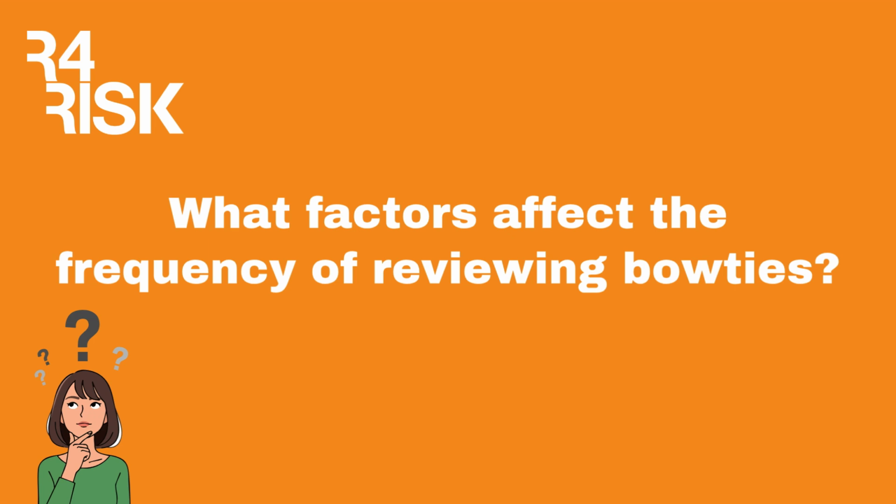But normally you would review your bow ties if you've had a major incident or a very close near miss. So you want to make sure that what's on your bow ties is now reflective of what's on site, and you maybe haven't missed a risk that you haven't previously identified.